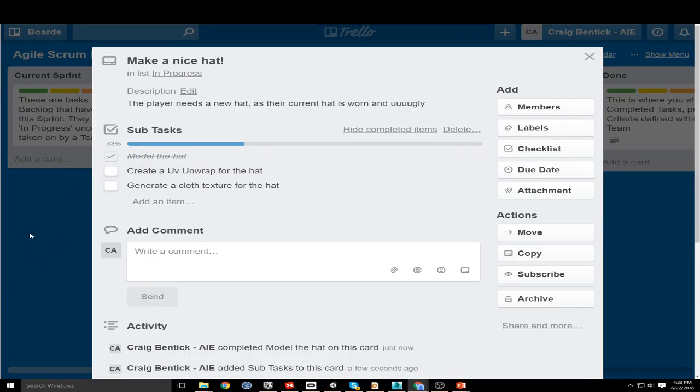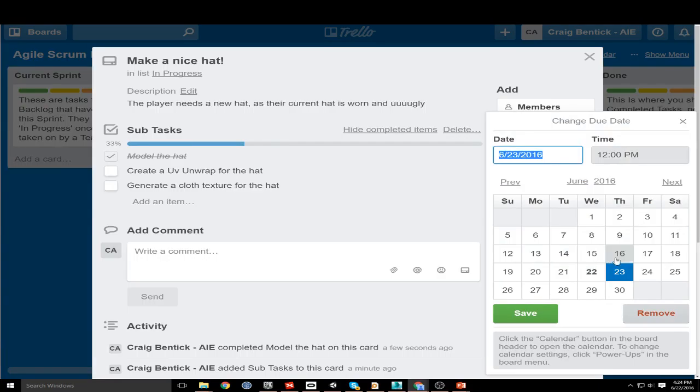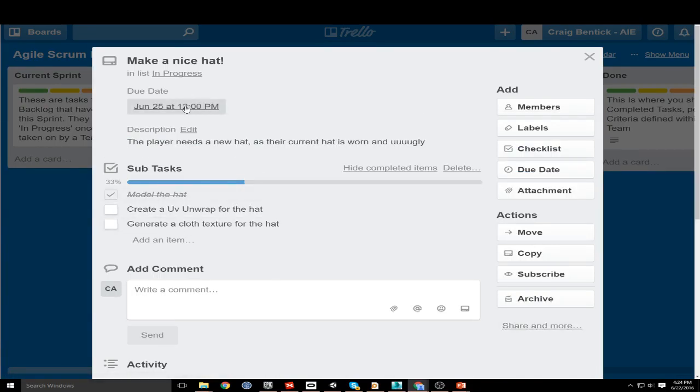So you can see how some of the methodology from the Agile Scrum stuff and that progress thing is coming through in here. So if you were to have a story and then list the tasks like this would be a really good way for you as a team to sort of see what that progress is like. And I know for a fact that you can have Trello integrate with other tools, like there's a Gantt chart tool. Somebody was mentioning Gantt charts earlier, where it can take these time frames, so we can add a due date to this and say it's due on the 25th, and now it has a date on it. It can take all of this information and generate a chart for you so you can get a high level view of the project.